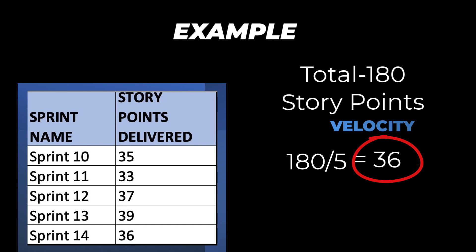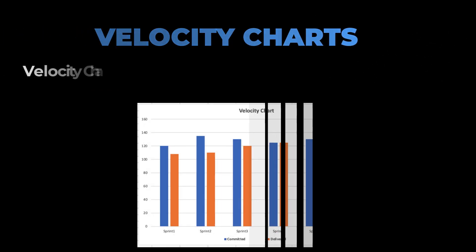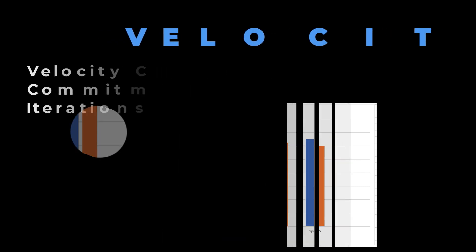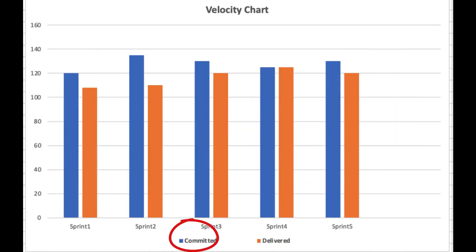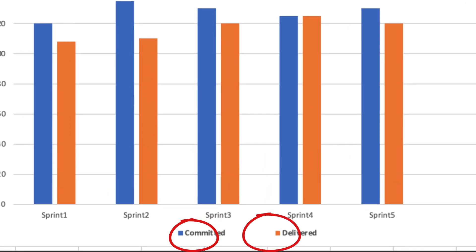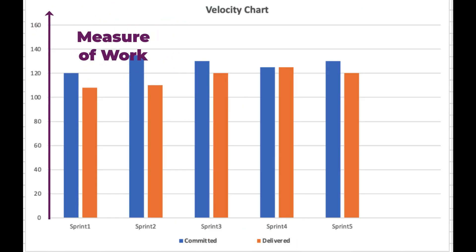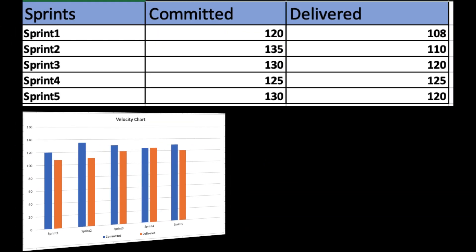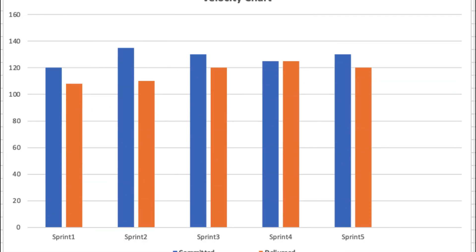We are now ready to talk about velocity charts. Velocity charts are comparison charts for commitment versus delivery for every iteration. The blue bar shows how much work has been committed and the orange bar depicts how much work has been delivered. The Y-axis is the measure of work and the X-axis shows the number of sprints. This velocity chart has been generated from five sprints of commitment versus delivery data. It can be read as: after the first two sprints, the team has been catching up on their commitments in the following three sprints. In general, velocity charts provide a view of whether velocity has been increasing, decreasing, or constant over time.